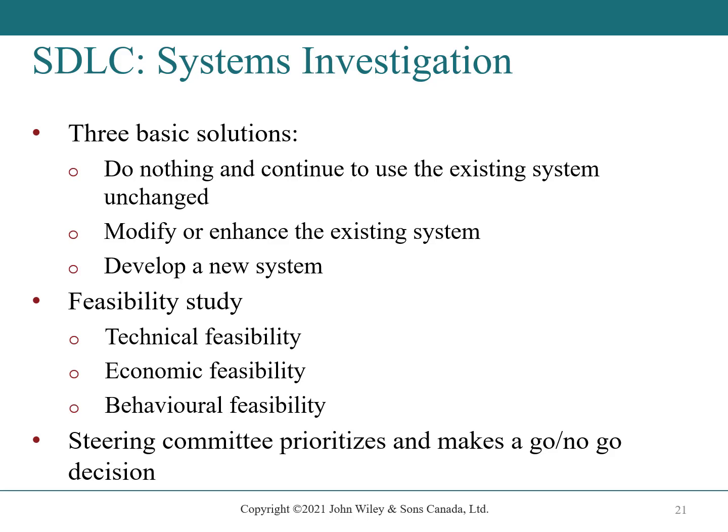The feasibility study will include technical feasibility, economic feasibility, and behavioral feasibility. Technical feasibility determines whether the company can develop or otherwise acquire the hardware, software, and communications components needed to solve the business problem. It also determines whether the organization can use its existing technology to achieve the project's performance objectives.